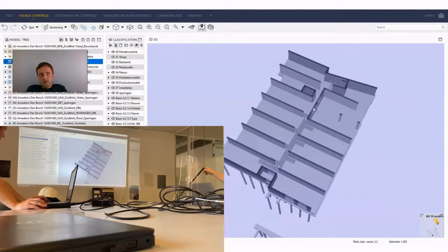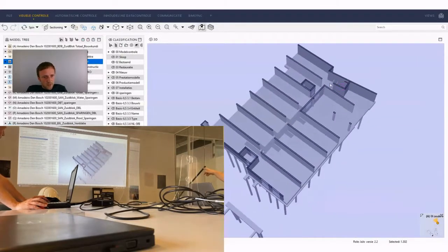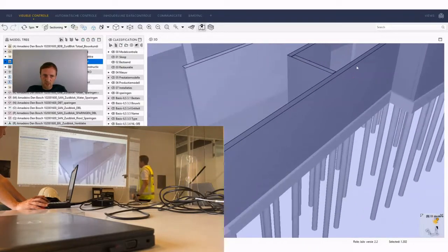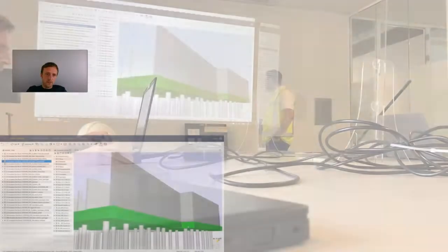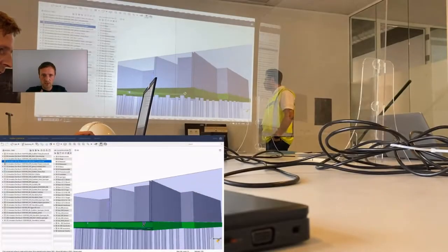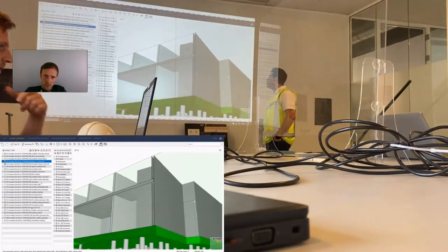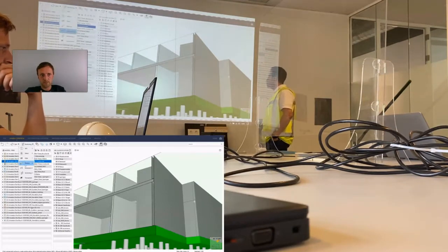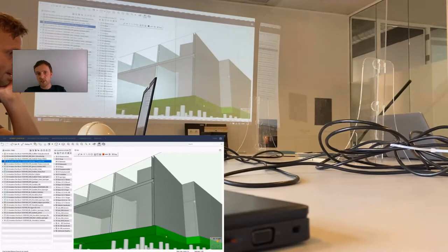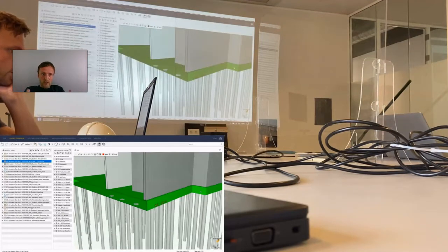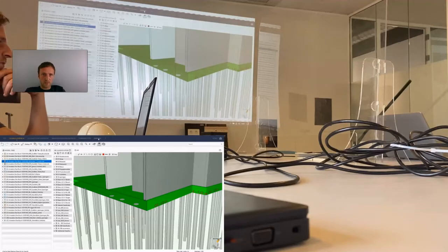It's a load-bearing slab, or I'm not sure how to put this, but it's actually right here where the site manager is coming towards the screen, and he's pointing out what the situation is, and he's telling about the bottom side of that slab that's now green in the screen. So they need to make sure they demolish this existing wall up until the right height, so to the bottom elevation of this new slab.